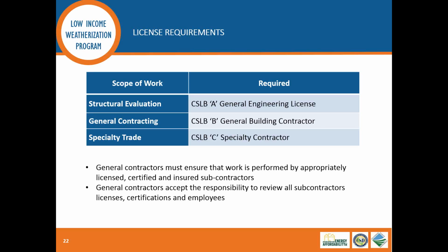For license requirements, really in essence here, we're asking that you provide documentation that you are appropriately licensed for the work that you're doing at the site. So if you're doing work on insulation, or you're doing work on HVAC, demonstrate your licenses, either general or specialty, that show us that you're appropriately licensed to do that work, and we will keep track of your various licenses. So send us what you have, and we will keep track of those licenses and request additional documentation as needed.